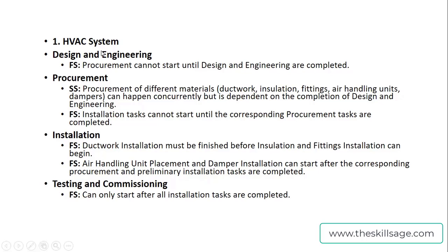Every system is a separate work package, interconnected. There are dependencies, then work packages are interconnected with each other. First level activities are interconnected and depending on each other, then work packages, then WBS, and then the whole project is going to connect in the shape of an activity network diagram.